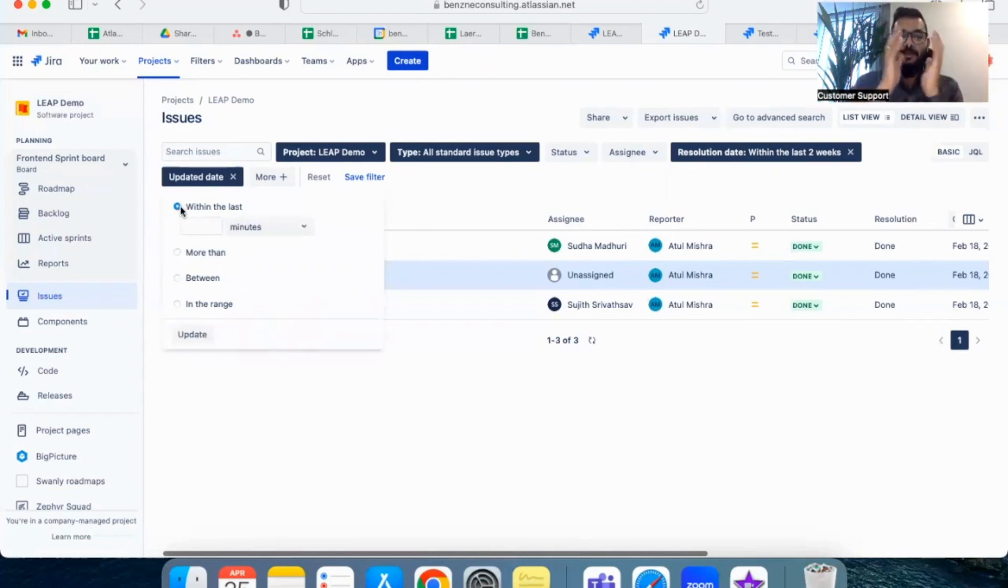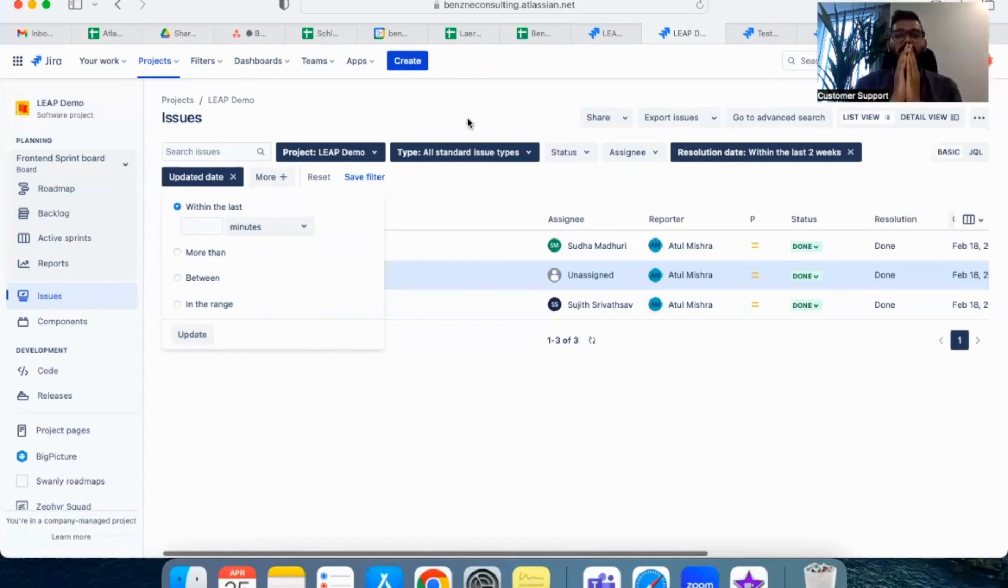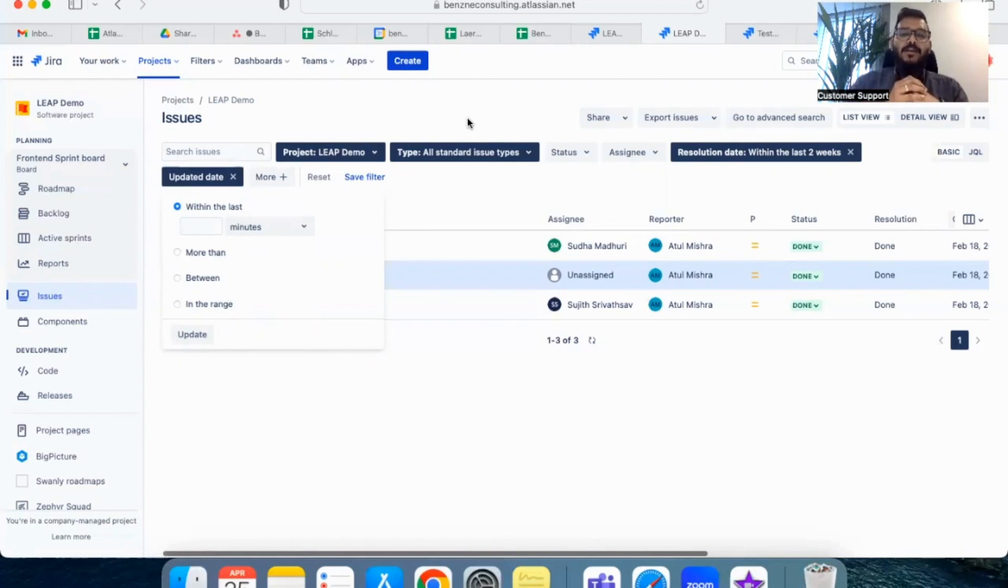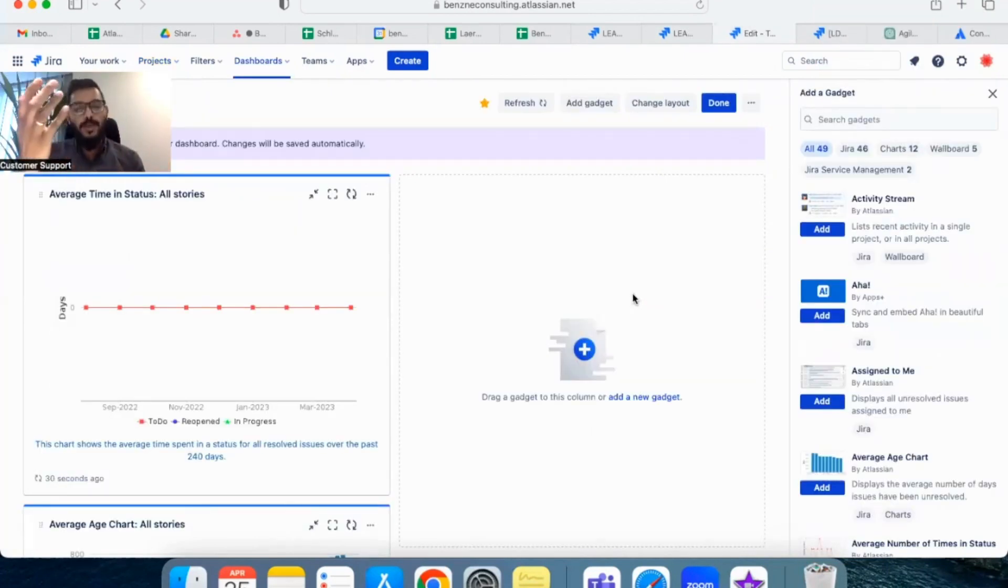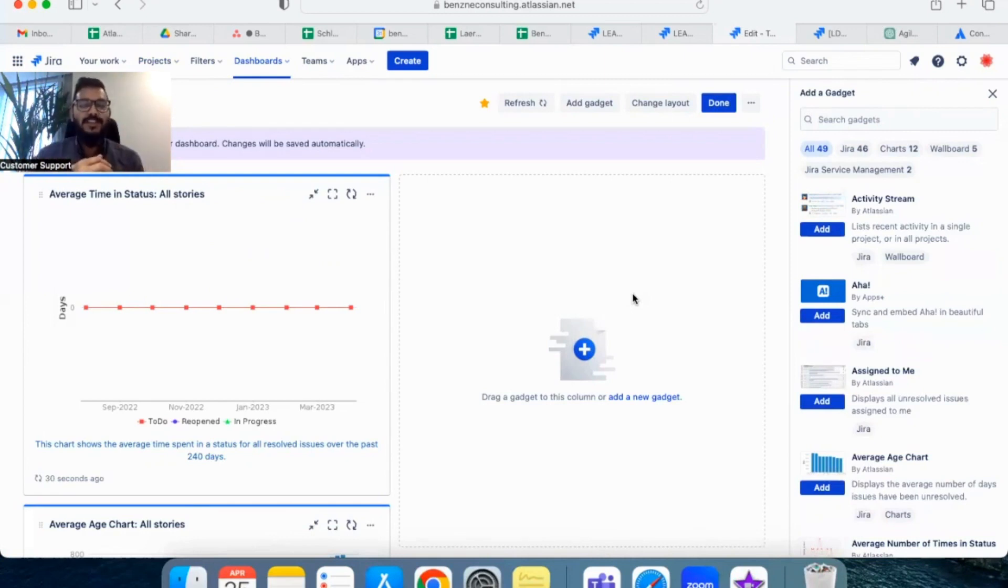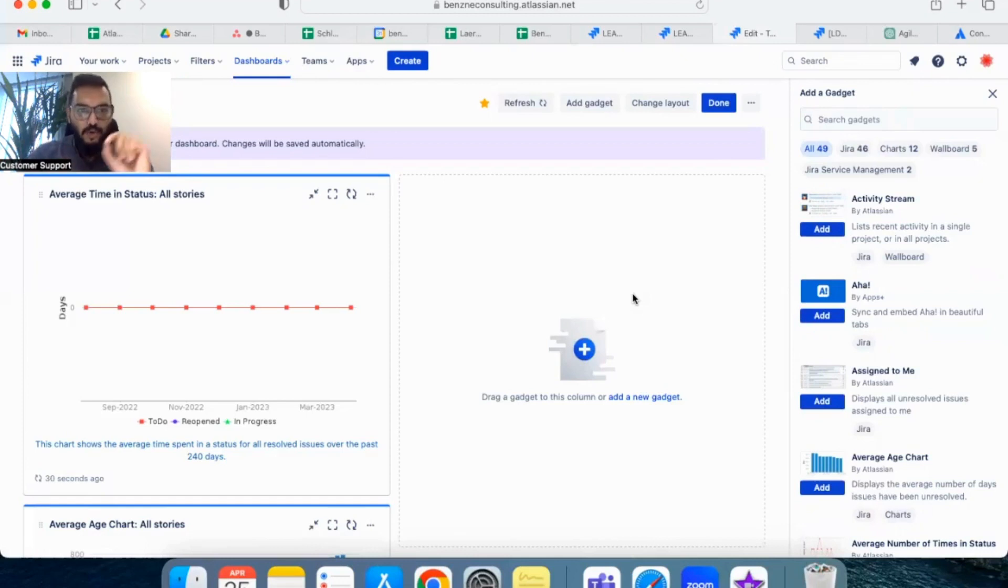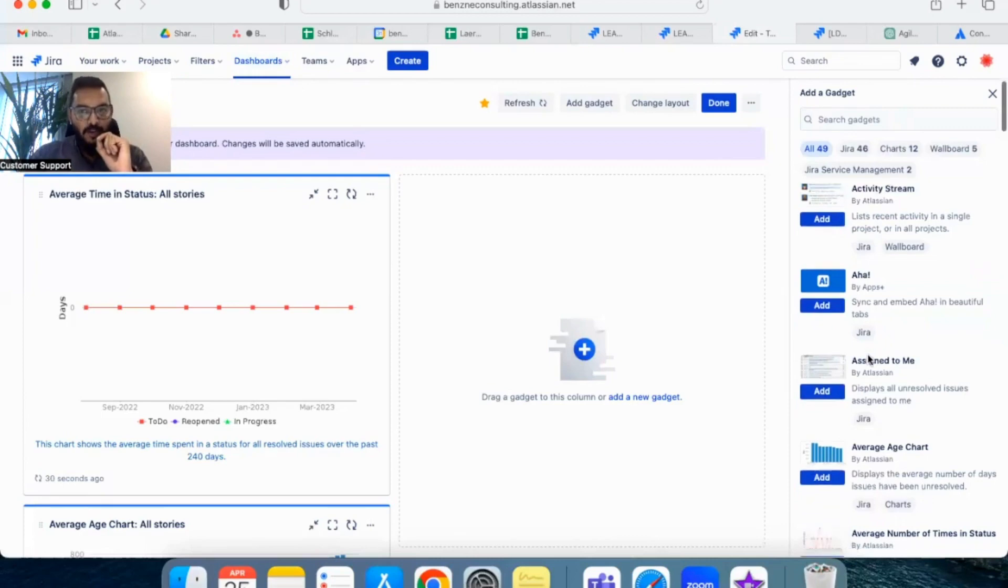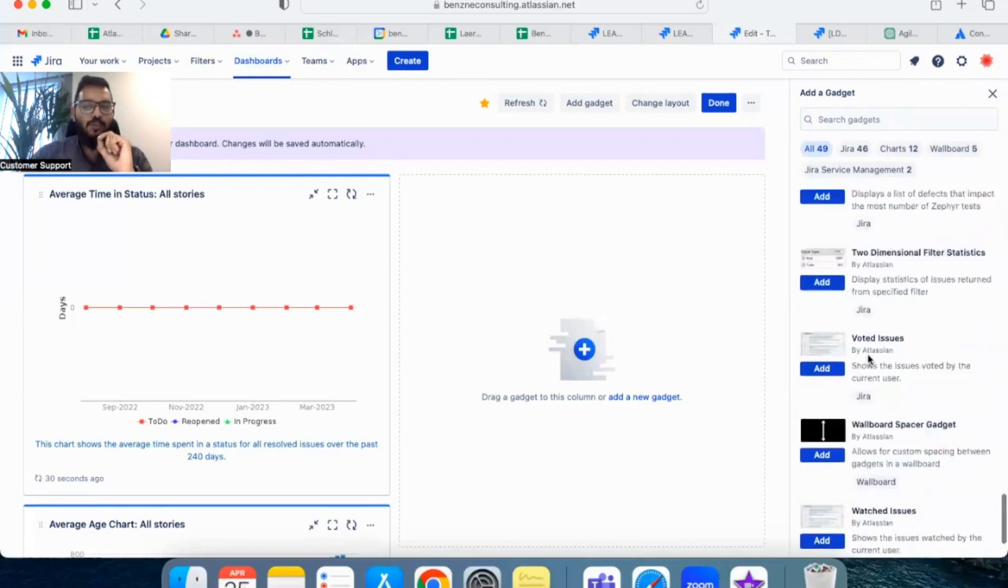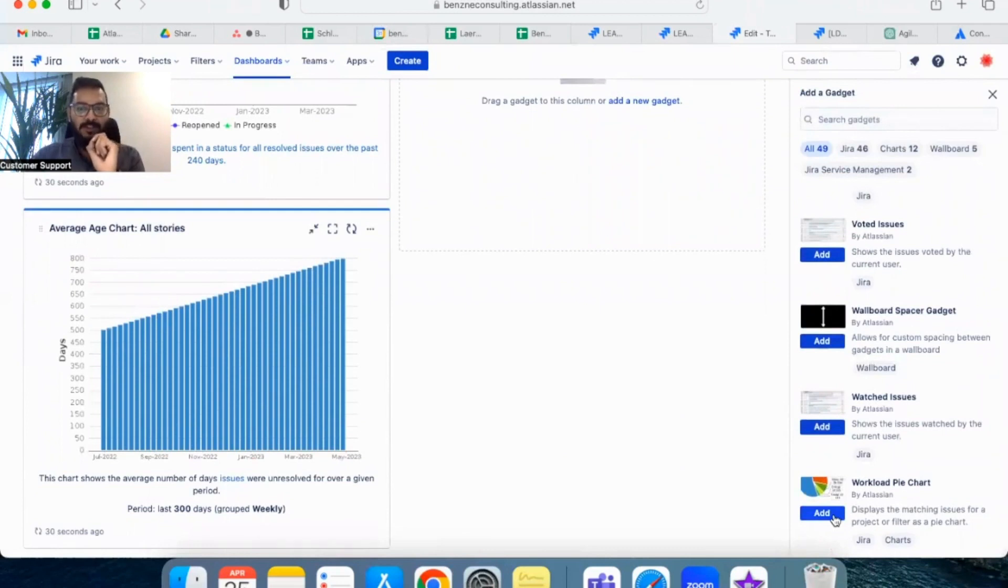Again, that also has something like updated within two weeks or within a range or between two dates. Again, you can use these fields to fetch all the tickets for your report. Now that the filter is created, let's see how we can get a graphical representation of how much time each person in our team has spent. Go to your dashboards in your project and click on add a new gadget on your right side. If you scroll down to the end, you will see a gadget called workload pie chart. Add it to your dashboard.